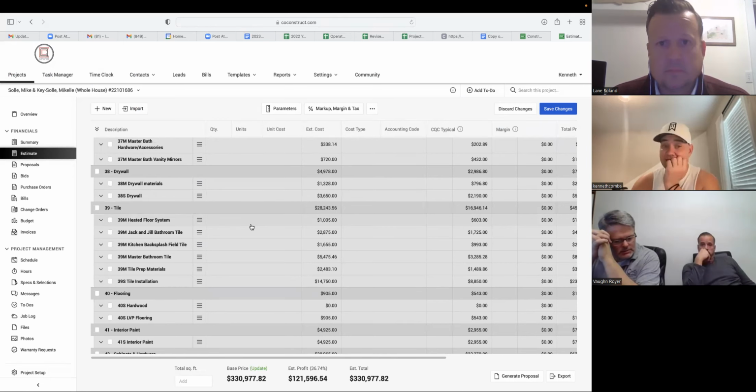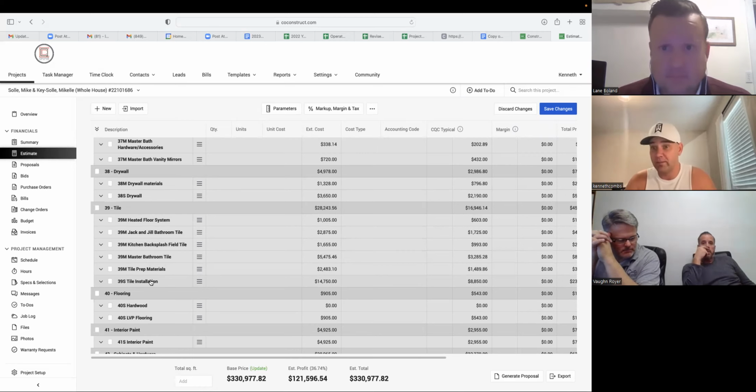I mean, there is sometimes when we have to have that hard conversation of, Mr. Tile Installation Guy, we're running tight on this job. I know we agreed on 14,000. We want to work with you for the long term. Can we help this client out to get this job? Can we do it for 13,000? I mean, that's a tough call, but at the end of the day, he's still getting paid well. The client gets it done and you guys get it on budget. And if you guys continue to win and stay successful, he'll win and stay successful long term.